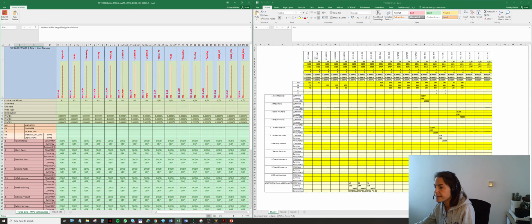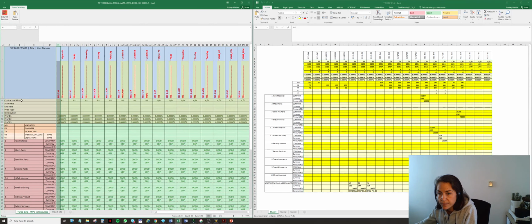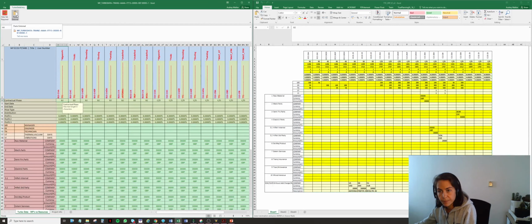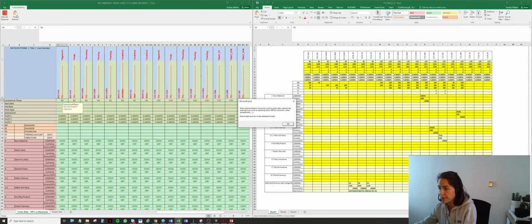So we pay attention to go on the right cell. So in this case here, we want to place our mouse on the cell H4, and we can click here on Paste External. Do not Control V because there is some formatting proper to this Excel file. Therefore, you really have to click on Paste External.